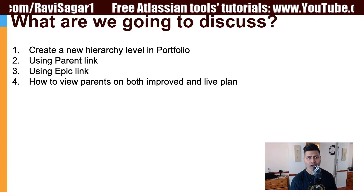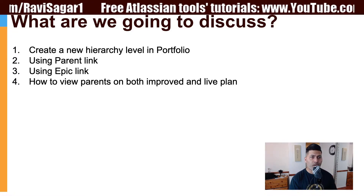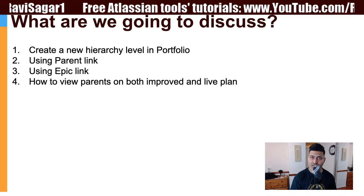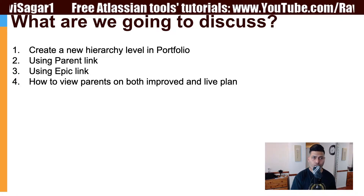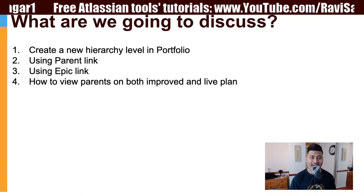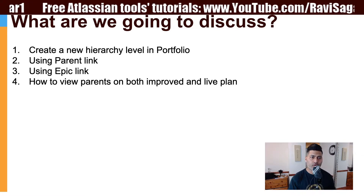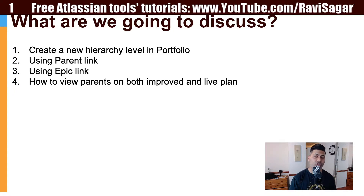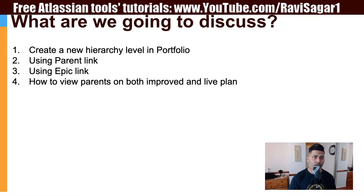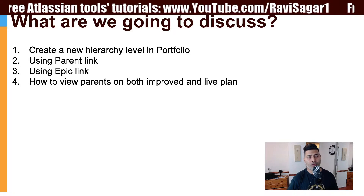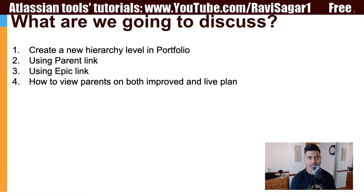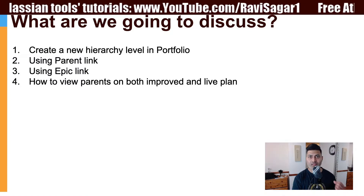When you have the hierarchy defined, you will have initiatives, then epics under initiatives, then stories under epics. You can view them in your plan, but with the help of the parent and epic link you can also see the actual issue ID separately as a field in your view, making it possible to manage those specific links.